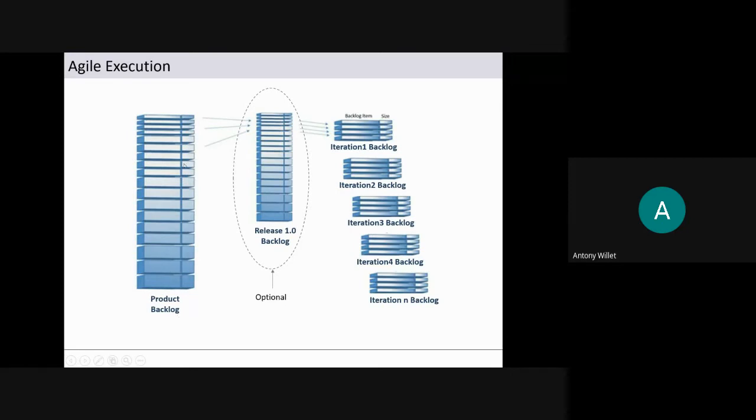It's nothing but a list of requirements. In waterfall, only when we have the complete list of requirements that the development team needs to deliver, we will go into the design and development phase. But it is not the case in Agile. Even when we have 40%, 50% requirements that is given by the customer, we can start the project, and actually we start the project. Okay?